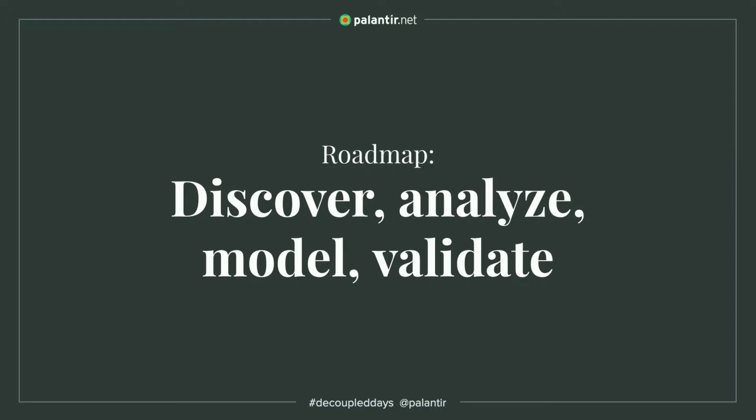I think the last stage is very important and isn't always done. We wanted to validate along the way, but it's often easy to get to the end of the project and say, all right, here's our content model, we're going to tell you why it's awesome. But if you haven't validated along the way and provided a way to iterate, you're missing out on a lot of chance to fit it very specifically to that organization.